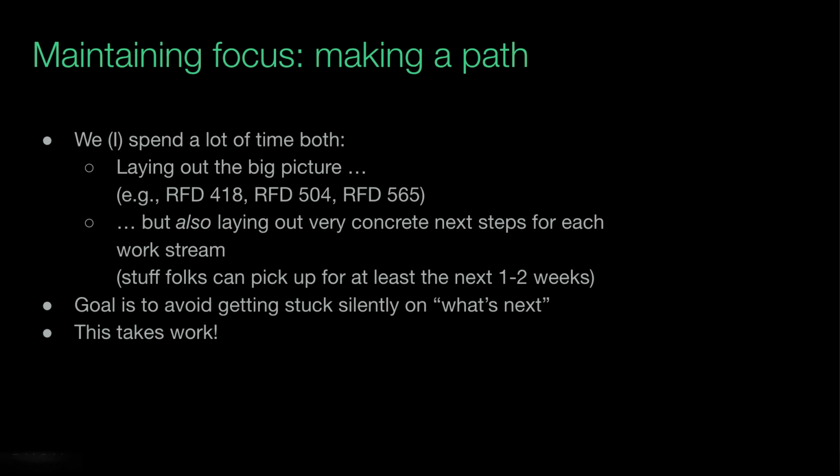So for me, I will usually bite off a pretty big project at a time. Like I'll say 2 weeks or a month at a time. And I try to break it into small PRs. And I've got the first PR up, it goes into code review. I already got the next 2 or 3 in my head about what I want to go do next. And I want to get those in my pipeline. I'm trying to keep my pipeline full. I'm trying to help other people do that where it is helpful.